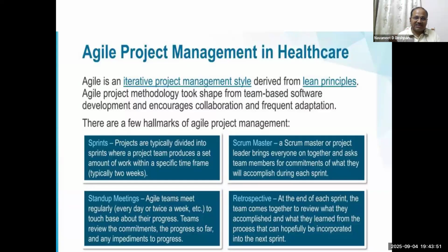The first one is sprints. The project is typically divided into sprints, where the team produces a certain amount of work within a specified amount of time, typically 2 weeks.